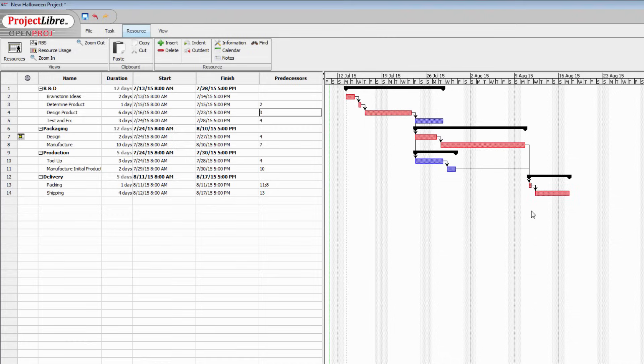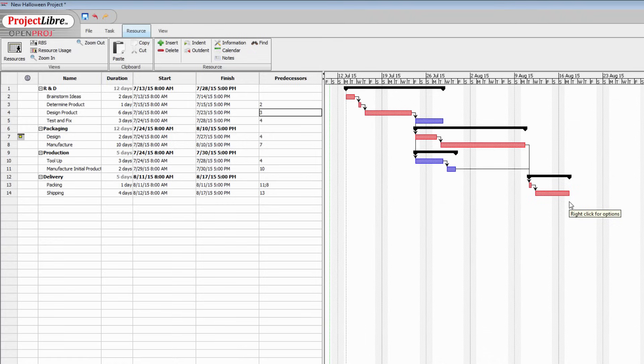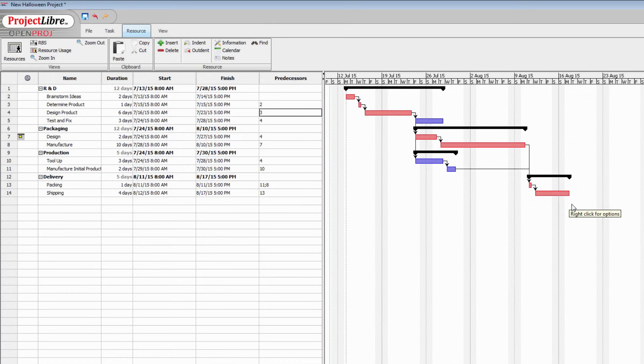So right now what we can say is that if all these processes, all these tasks take place in the time that we've allowed for them and no longer, then we can say to our customers that they're going to have the product in their store somewhere around the 17th of August.